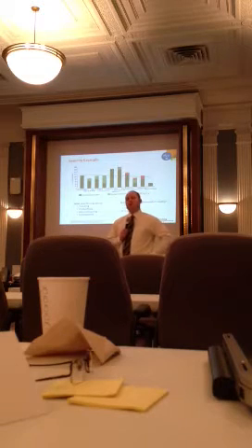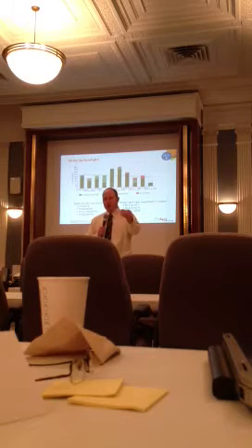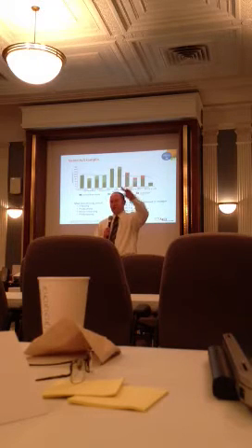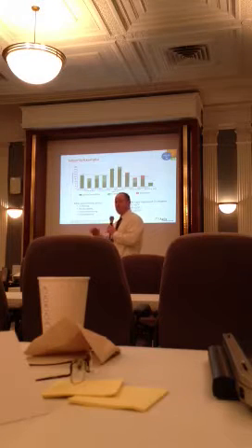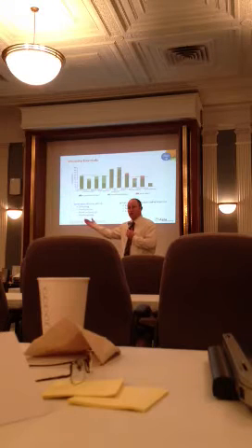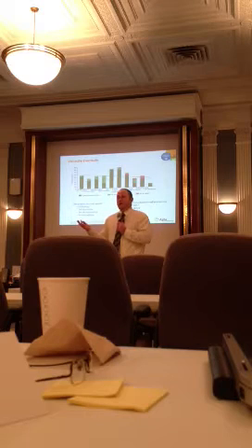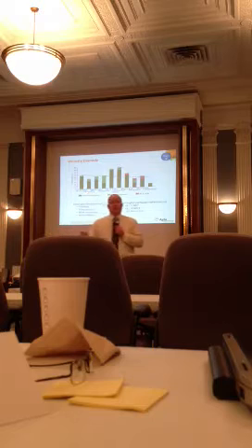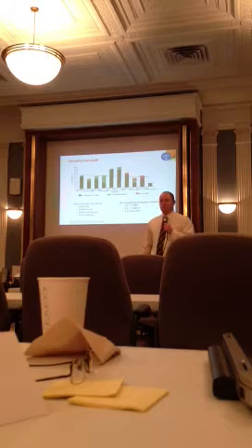And I understand, and what I'm saying here actually with Agile is you can do exactly what you just mentioned. So you have this full scope of work, and you can see my lead architect leaving. The team didn't get no work done. We still got 60 story points accepted of work, right? So all we did was throttle back a little bit based on the person not being here. It's not like some particular piece of the project went into standstill mode because we lost our top person. And that's exactly what you're trying to avoid with an Agile project.